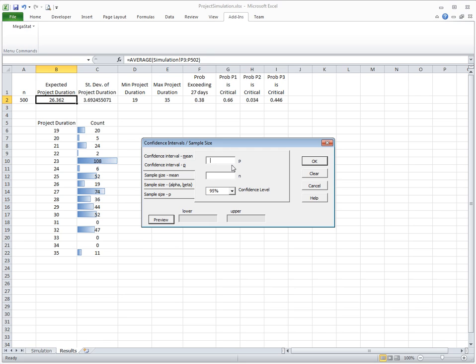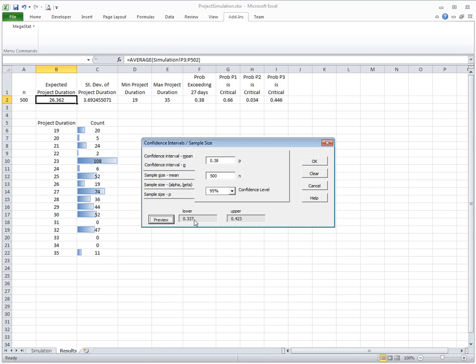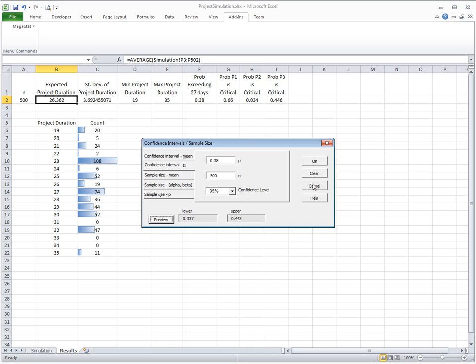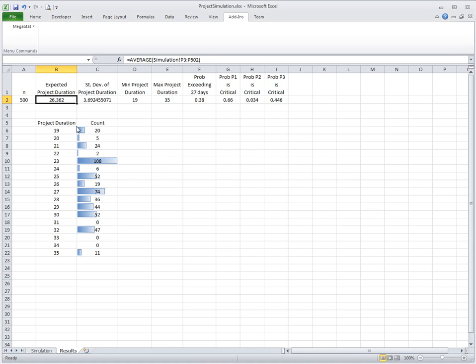If I put 0.38, and this is obtained based on 500 experiments, what is the true probability? It lies somewhere between 0.337 and 0.423, with 95% likelihood. Even though the actual probability could be lower than this, it is still very high. Even in the lower level of the confidence interval, it is still very high. I think we shouldn't promise, especially if we will have a very high cost of being late, we shouldn't promise 27 days. That concludes our simulation example of project using Excel.